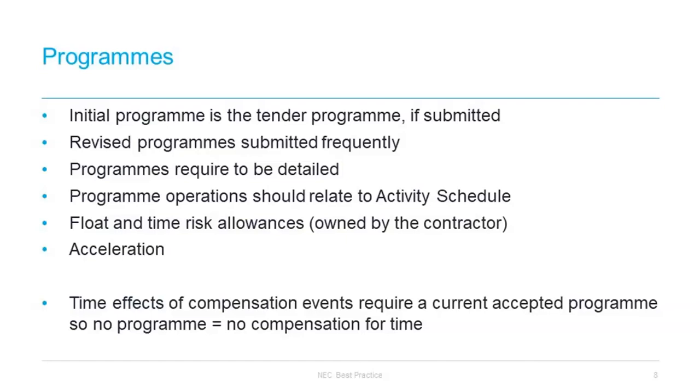However, you should remember that the project manager rejecting programmes erroneously is itself a compensation event, and this can be used if discussions break down. So we'd recommend contractors not to be put off by continuing to submit programmes and keep them up to date for two reasons. Firstly, if the contractor does escalate this sort of dispute to adjudication, then that would be the basis upon which they are going to assess the impact of those rejections.